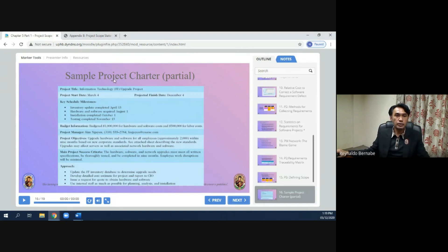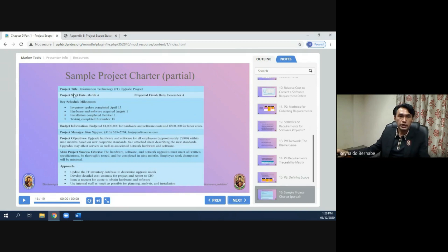Here is a sample project charter. The project title is 'Information Technology Upgrade Project,' with a start date and end date listed. Key schedule milestones include: inventory update completed, hardware and software installation completed, and testing completed — forming a timeline. Budget information covers the cost of hardware, software, and labor.